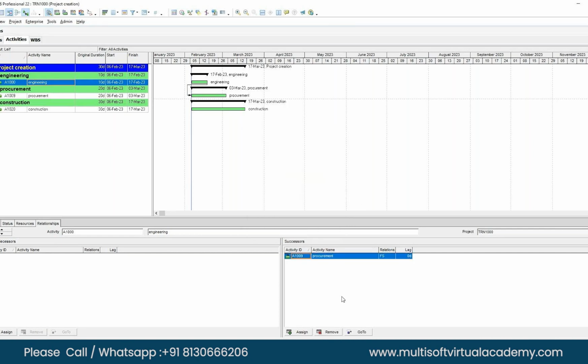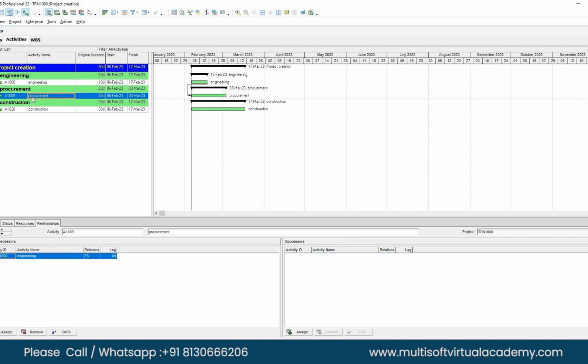Now we want to save our time. I'm just skipping the scheduling part because once I link, I will hit the schedule and everything will be aligned. There are two ways. You change and hit the schedule so that it gets aligned, or you link all first, then hit the schedule. It's up to you. Yeah, I'll just do the linking.